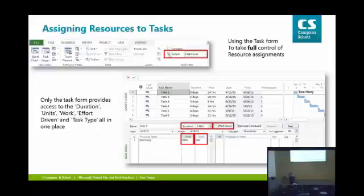Okay, so the next scenario is, what is non-effort-driven if I don't check it? If I was to assign a secondary resource to that task as it stands with it not being checked, they would get an additional 24 hours of work, making the task overall have 48 hours.